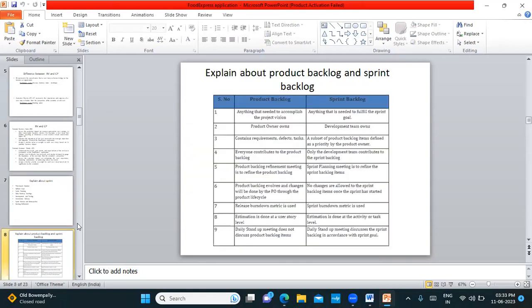The next question is about product backlog and sprint backlog. The product backlog is a document owned by the product owner that contains a list of all requirements, irrespective of which sprint they belong to. The sprint backlog is what you have for a specific sprint — it is owned by the development team and is a subset of the product backlog, since you're only pulling out a few user stories for that sprint. Differentiate these clearly in your answer.